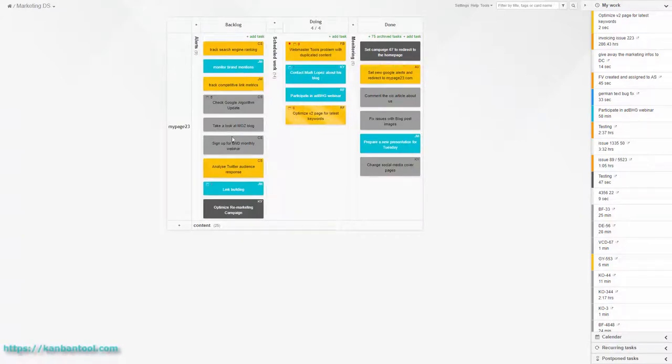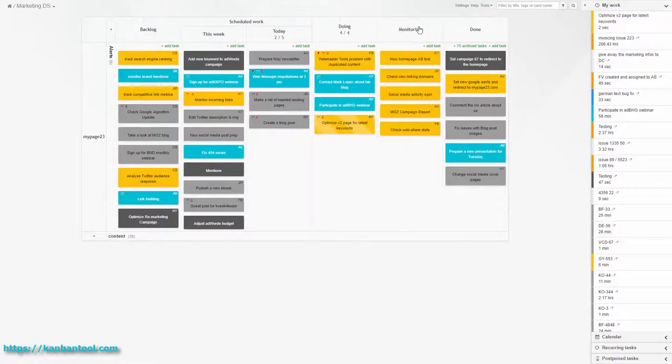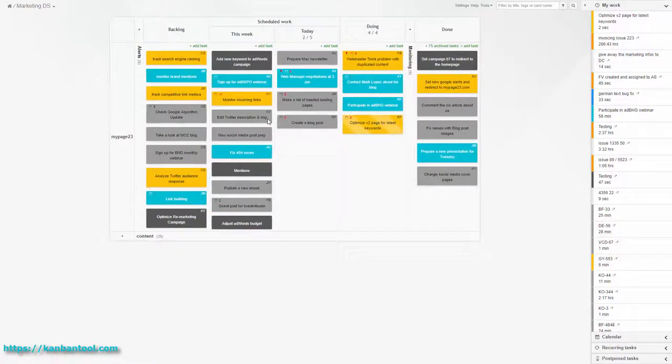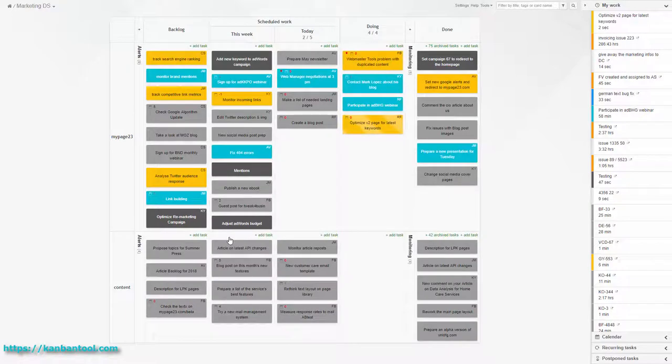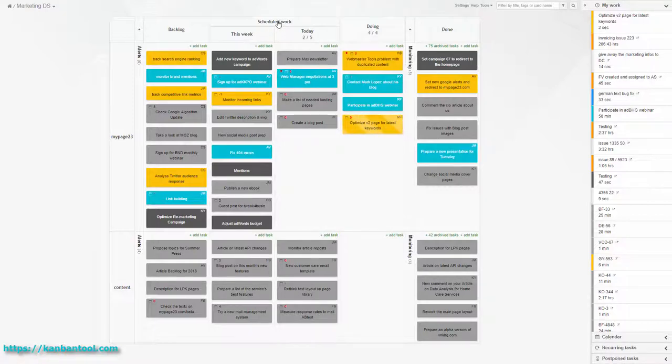The basic components of a good Kanban for marketing are a well-ordered backlog of tasks, columns and rows through which work will be moved informing everyone of current state, and the addition of work-in-progress limits applied to most, or at least the in-progress column. With these characteristics met, work items can start to flow continuously through the process stages.